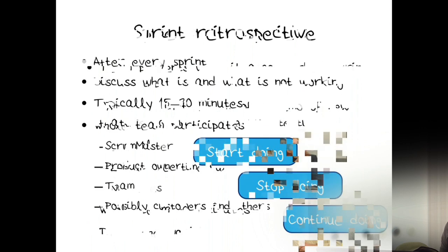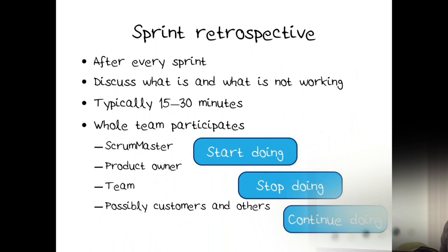After the review, you have a retrospective. Again, three questions for the team. Is there anything that we're not doing that we should start doing? An example here is that we should code together once a week. Even if we cannot be in the same physical location, we should all be working on this on Thursday afternoons together. Could be something you might want to try to start doing. Is there anything that we're doing that we should stop doing? Could be spamming the team with jokes on Slack or whatever it is. And is there anything that we should continue doing?